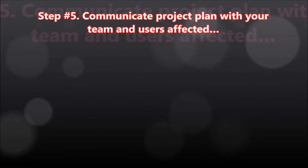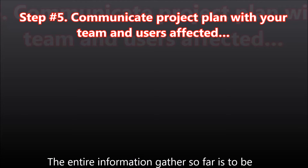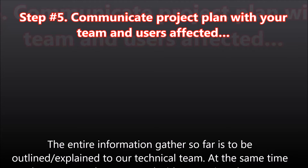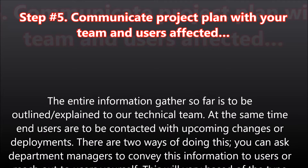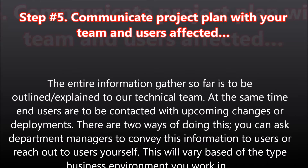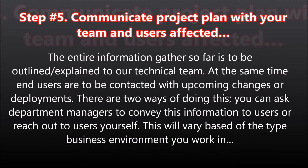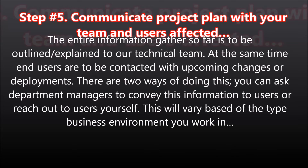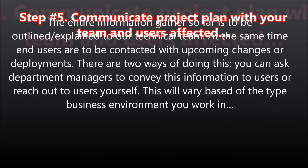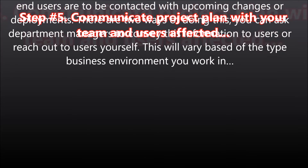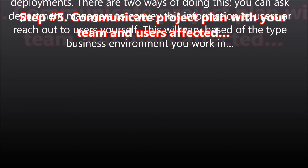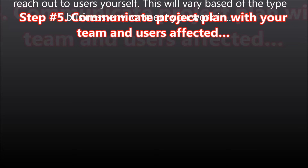Step number five: communicate the project plan with your team and the users affected. All the information gathered so far is to be outlined and explained to our technical team. At the same time, end users are to be contacted about upcoming changes or deployments. There are two ways of doing this: you can ask department managers to convey this information to users, or reach out to users yourself. This will vary based on the type of business environment you work in.